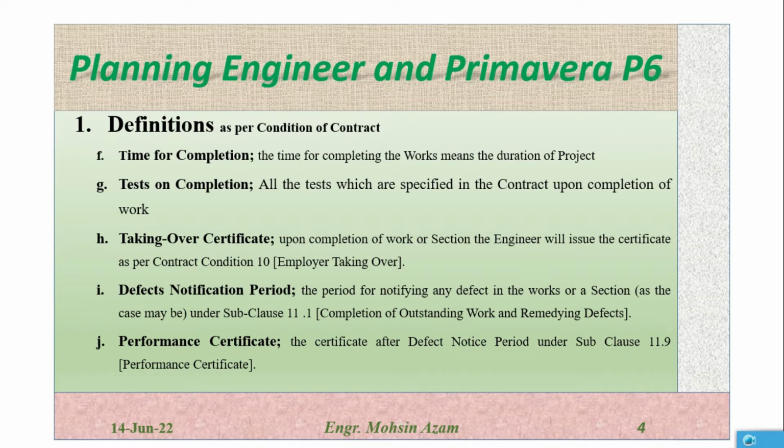Performance certificate, the certificate after defect notice period under subclause 11.9. Performance certificate is actually a certificate after the defect notice period. So once we complete the project, we will request the engineer to give us the taking over certificate, and after the taking over certificate, our defect notice period will start. And after completing the defect notice period, we will request the employer to provide us the performance certificate.